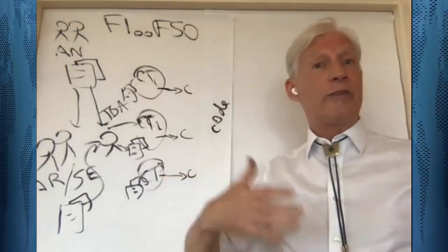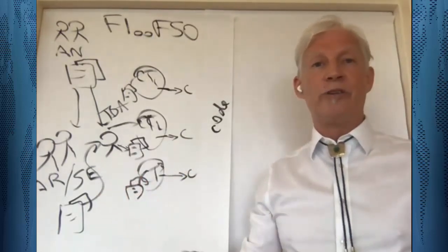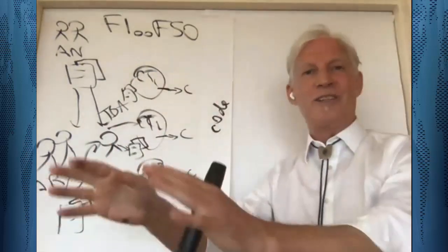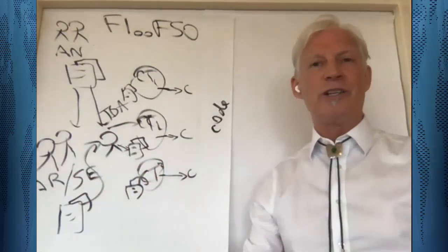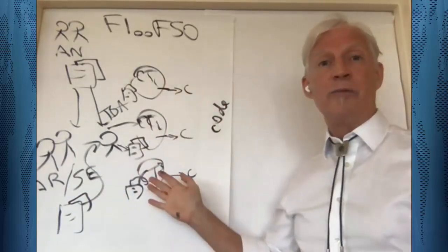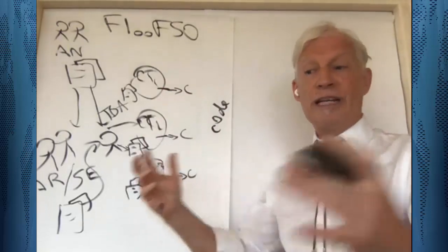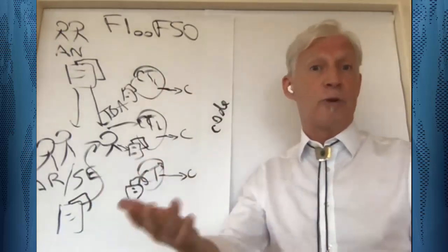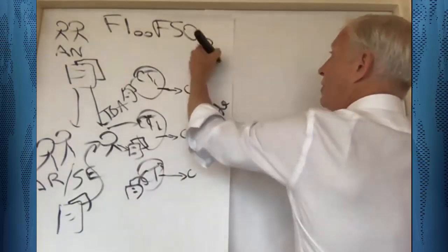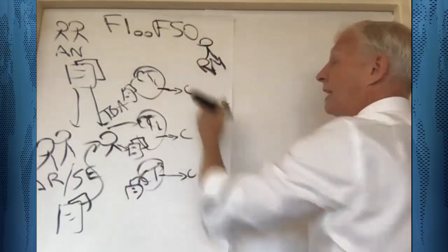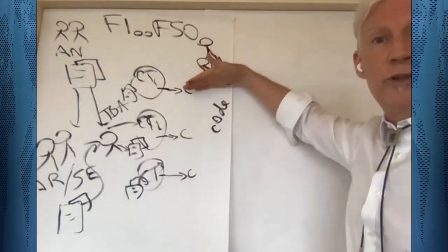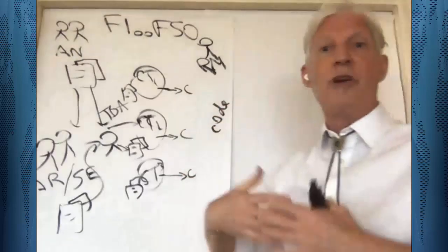Now, moving on, at some point in the future, 2 or 3 months in the future, someone's got to put all of this code on trucks, send it to the factory where it gets all integrated together. Who's going to do that? Which of the component teams is going to be responsible ultimately for integrating all of the code together? And of course, the answer is not clear. So it's very common to introduce another role, which traditionally has been called release manager.